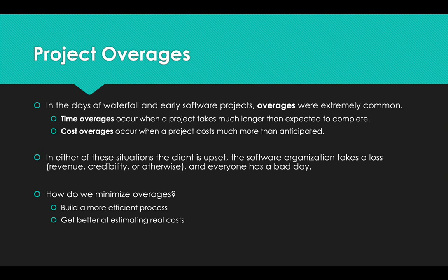If we are married to Waterfall and have to use it forever, we could get very good at baking the time to redo whole projects into the real cost. If you anticipate the cost to be $20,000 and think you might have to rewrite the program 5 times, you would tell the client $100,000. Maybe you only have to do it 4 times and you come under budget, even though the real cost is extremely inflated. We can approach the problem from either of these perspectives.